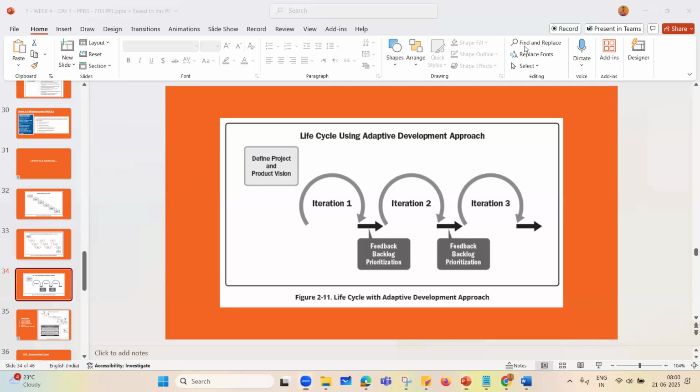If you go to any project management tool, when you create a project, the large project can be broken down into multiple requirements. At a high level, these will be the features the product owner is writing. Why? Because the product owner in the agile world owns the product backlog. With me so far? Yes.